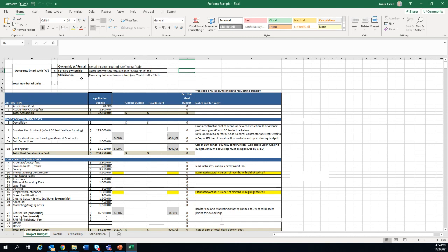And then you have to submit those bids to the city along with your scope of work, and then a finalized budget. And that's where we're setting what your final budget would be for constructing the home. And then you actually close on city financing. And generally speaking, we give developers about 6 months from our approval time at City Council to then close on financing, and then if you're purchasing the lot from the city. So generally speaking, let's say you're applying in April, you may not actually be beginning construction until late summer or early fall. We try to time it so that you could do so before the ground freezes.